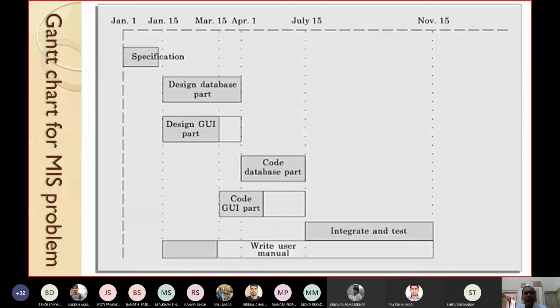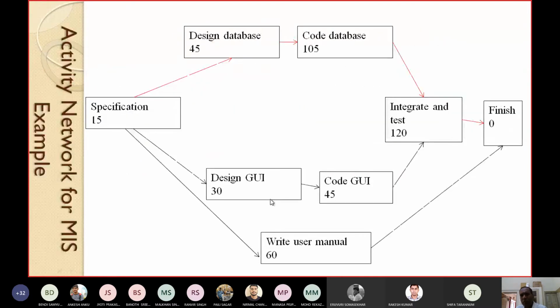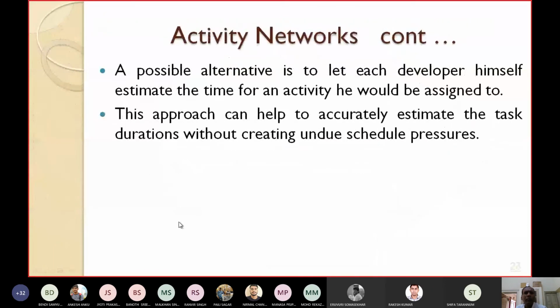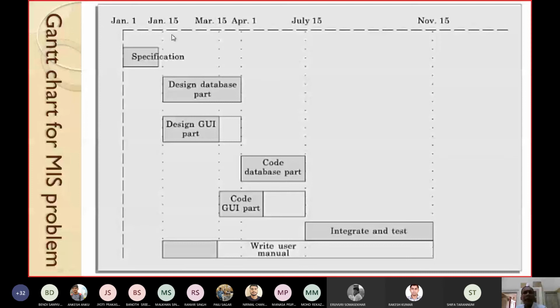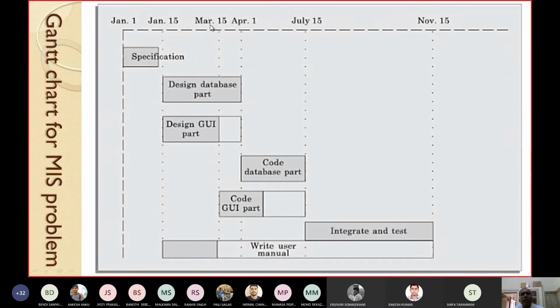Again, just see, a little bit of a mistake. It takes 45 and 30. We have to start from January 15 and it will take 45 days. That means January 15 to the end of February or so. So there is a mismatch here. Please correct this date. It should be the sum of 45 days from January 15, so 15 days from January and 28 days from February. Then this should be March 1. I'm sorry, this was a mistake. This should be March 1.